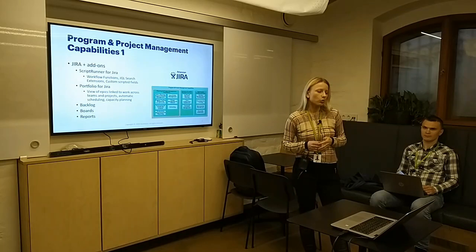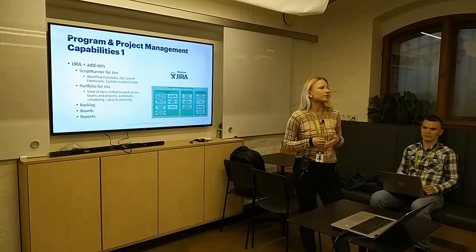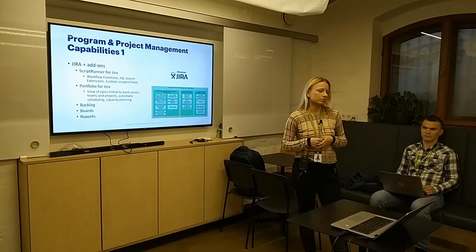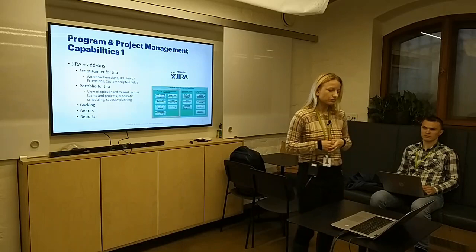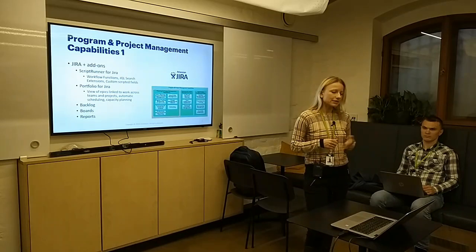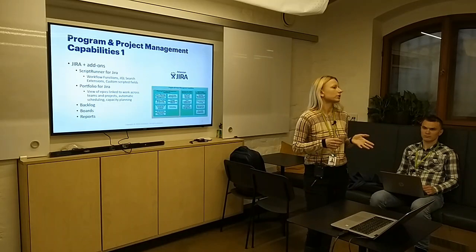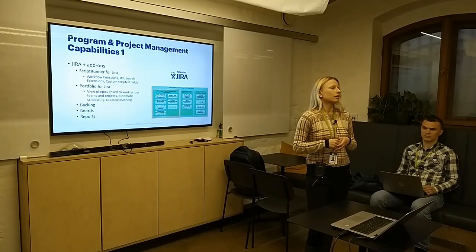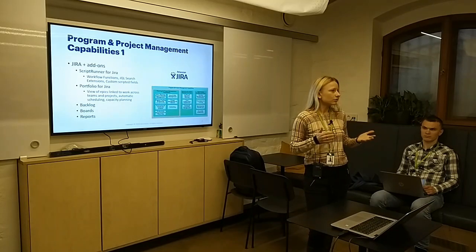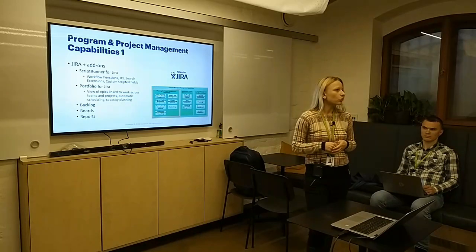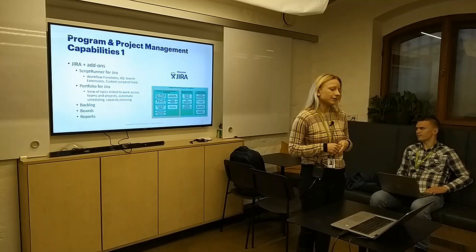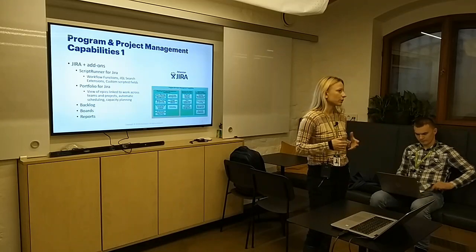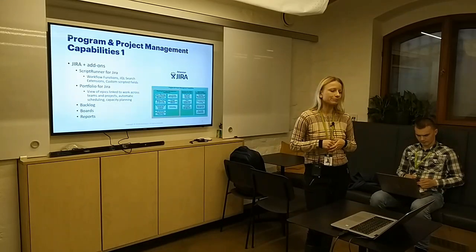Scrum Masters and program management use boards and review high-level planning, and the epics link to work across all the teams. As a team, we use our own board with our own issues, but they are all visible through this portfolio board in Jira.